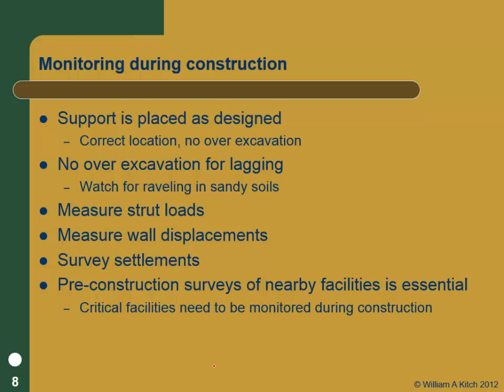And then critical facilities. I want to say Wyndham, that's not right. What's the new hotel downtown LA they just tore down and built? Wilshire Grand. The new Wilshire Grand. They're right next to the, is that the red line or the purple line that runs down Flower? They're very close to the subway there, so they've got extensometers in the subway, and they've got laser surveys going on the subway during construction and during excavation, and monitoring those things in real time. These days, you can monitor stuff in real time and look at it while you're out to dinner on your cell phone. And there are people that specialize in that.